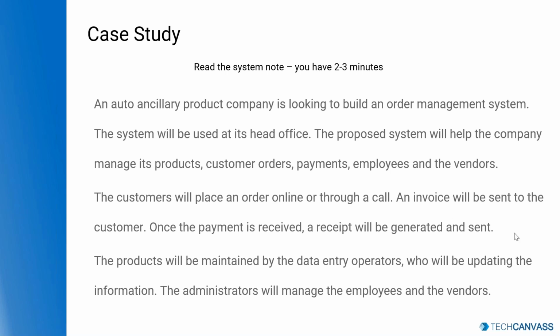Correct, Mike. That's what I think. That is the correct point, is that you need to have that scope variation clause. Yes, Mike has mentioned the name. So that's something which you need to have an agreement with the customer, saying that if there is a scope variation, you pay for it. Otherwise, it leads to confusion and unnecessary conflict. Yes. Got it.